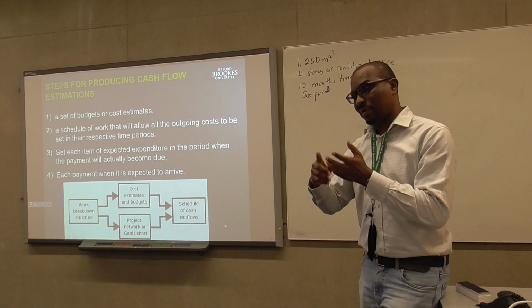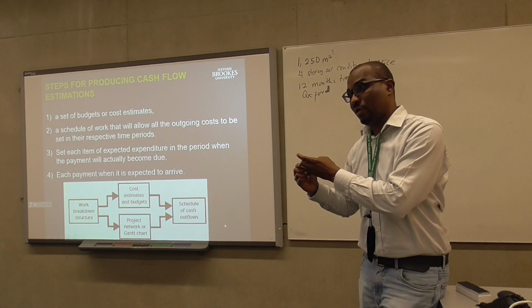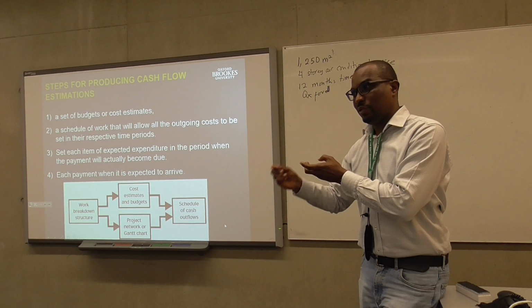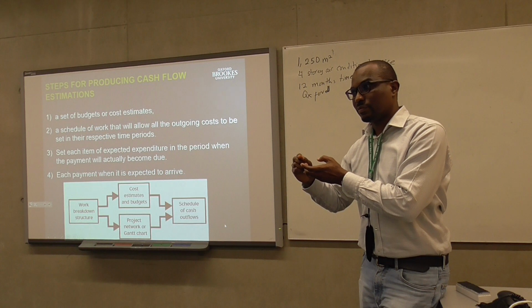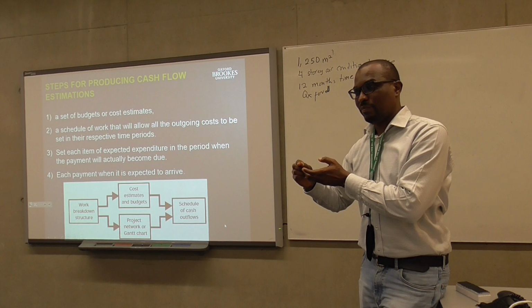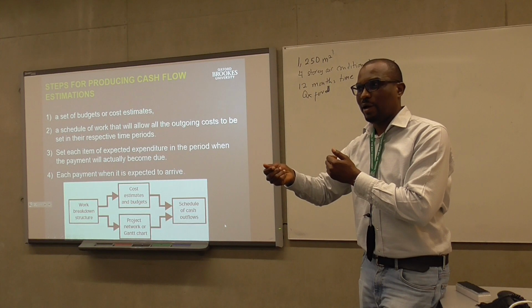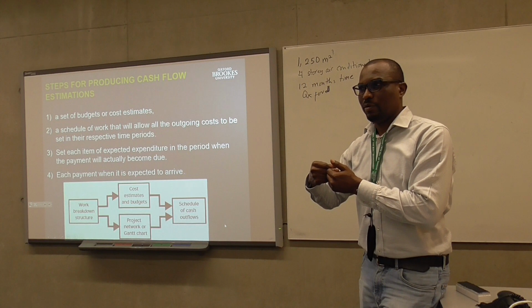To be able to spend that 60 million, I need to go to the bank to negotiate loans. I need to pay interest on those loans. So you are losing because you're paying. Exactly. Which means if I have to do that, then as the client, I need to bill you higher. I need to incorporate that as well. You get it? Yeah.